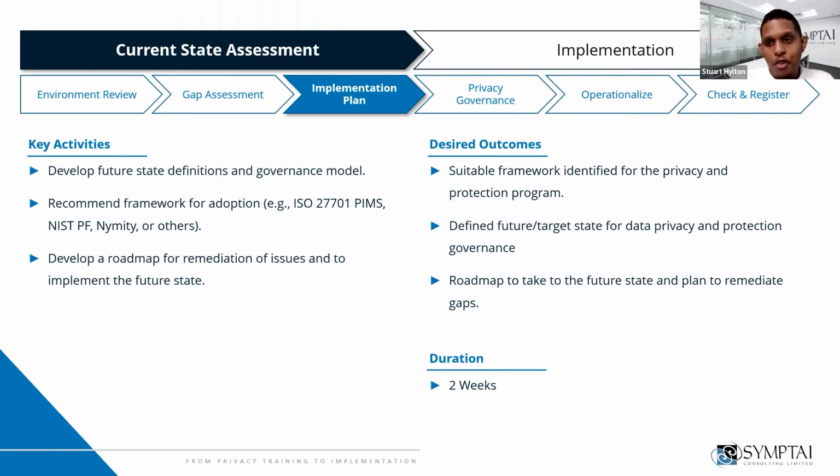This can piggyback off of what you already started to use for your gap assessment. We've used this framework to assess ourselves. We've created recommendations based on that framework. So we're going to move forward implementing this framework as a means. It doesn't mean that you have to get certified for them, but this is our guide that we're going to use. And then develop that roadmap to 1, implement what's not there, and 2, remediate any other gaps. And that timeline can vary depending on the size of the organization, depending on the complexity of what you're doing.